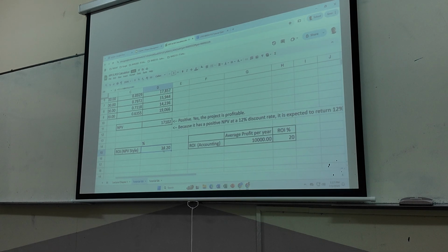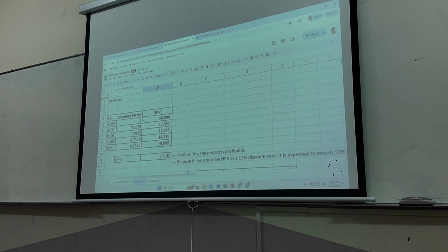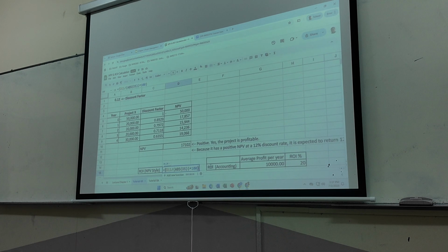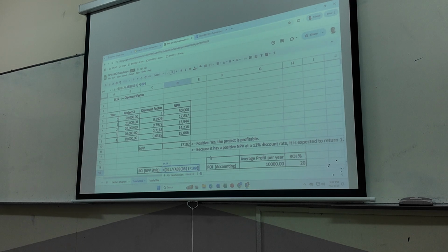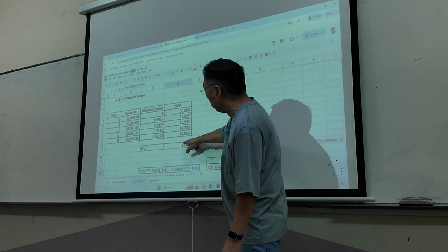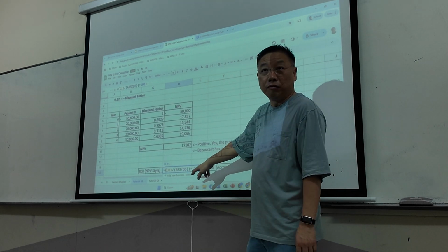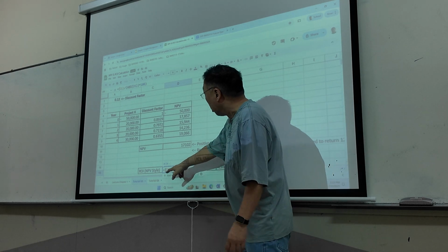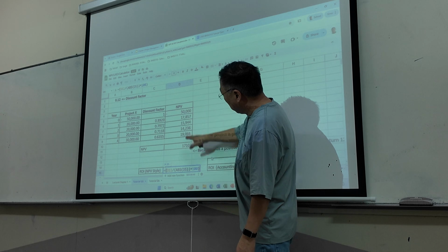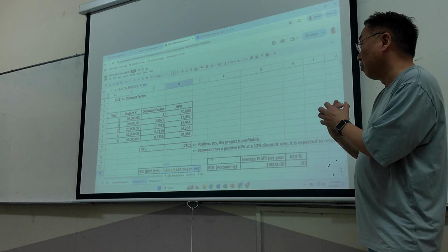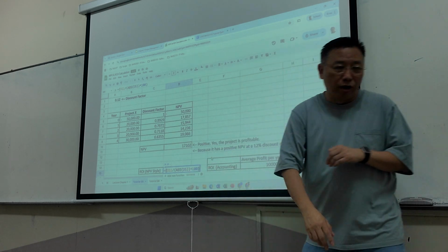So the answer is 34.2%, the ROI. The formula is this. Hopefully you can see. Let me make it smaller. 175. Okay, 175 I can show you already. So this 34.2, the formula is D11, which is the NPV value, over what you've invested, 50,000, but I've just made it positive, ABS absolute, converts it to a positive number. So it's actually 70,000 divided by 50,000 times 100, then you get the ROI. So your return on investment, what you get back, net profit, using net present value, is 34.2%.